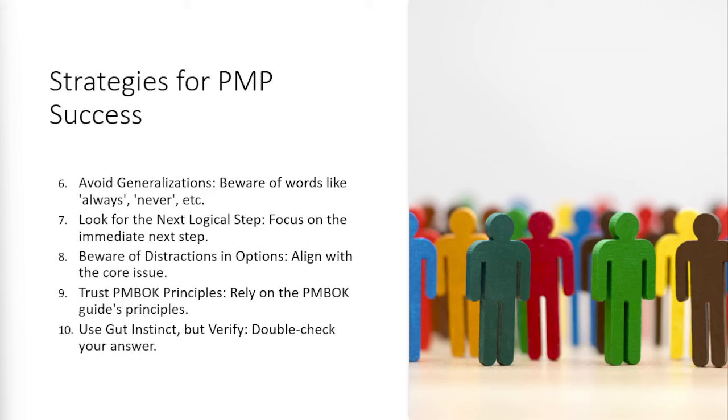Look for the next logical step. Focus on the immediate step. You have identified your risks. What should you do next? Plan the risk responses or perform a quantitative risk analysis. It would be a quantitative risk analysis. The risk response will come next.